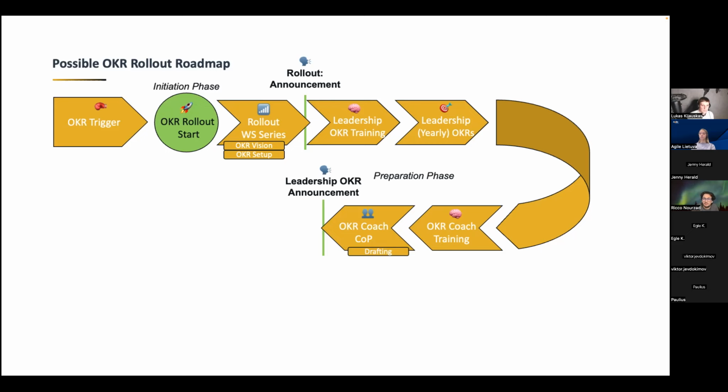Then the next step is selecting and educating OKR coaches within a 2-day training, and afterwards establishing an OKR coach community of practice so that they can exchange and the whole thing is sustainable. Having all these preparation steps, we can finally start with the announcement of the objectives and the